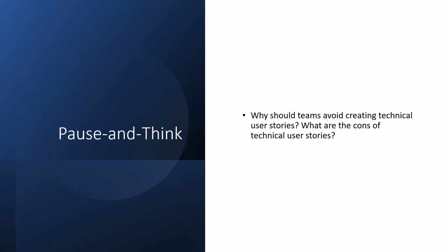When technical requirements or specs are captured, they are for the benefit of a developer, and they often create dependencies, therefore decreasing flexibility. Sometimes a user story begins to sound technical because it is too large and needs to be broken down into smaller user stories. Ultimately, user stories should be functional in order to better suit an agile framework.